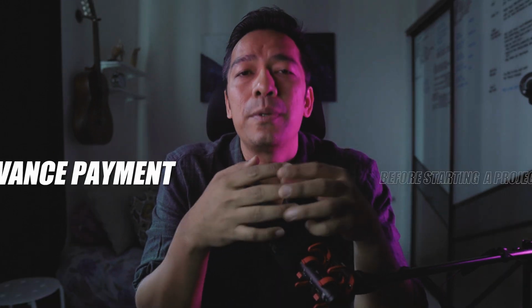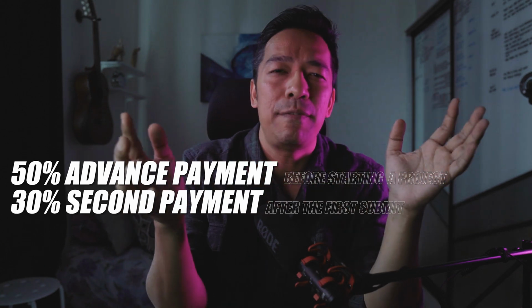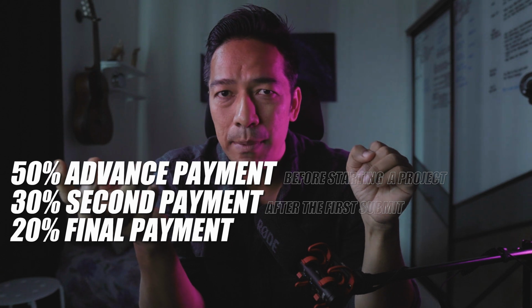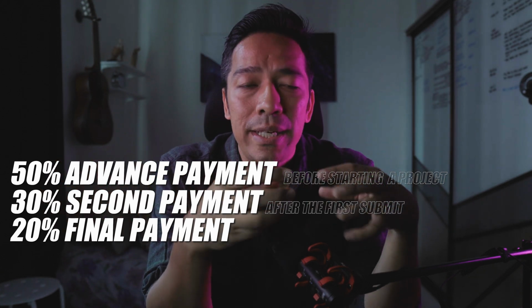I will advise you to request and come up with an understanding to get a 50% advance payment, then a 30% payment for, let's say, 50% of your work that you've completed, and then the rest 20% of your payment at the end of the project. That way you will have more in your hand instead of waiting for the rest 50%, because most of the times you would also have spent on things and spent on your time and your efforts. Waiting for that 50% for months is going to be a crazy hectic time for you.